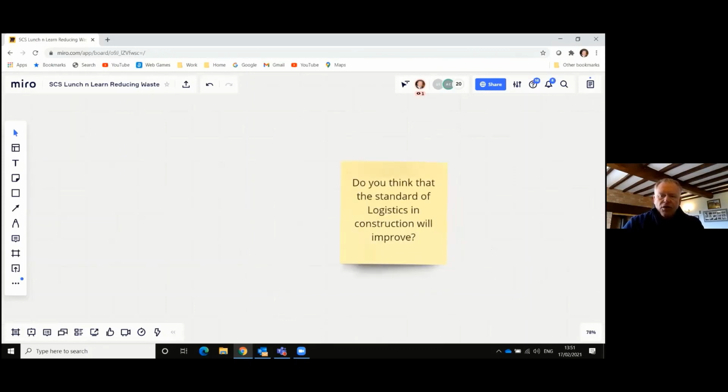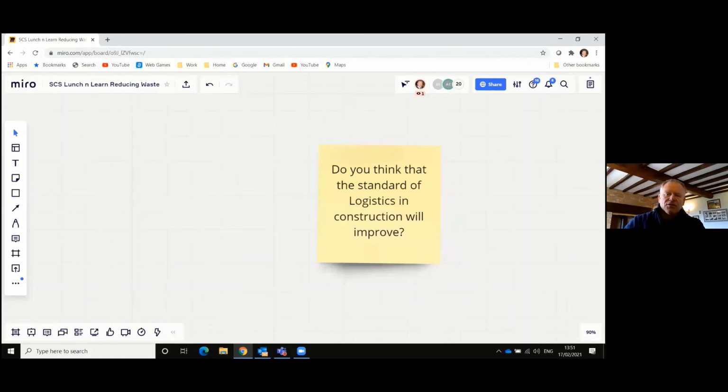Get them involved when you start to map out the process of your project and what it looks like and who's involved. Don't just think about the contractors doing the build. Think about the supply chain and the logistics bringing the materials in, and work with them to understand how you want that material brought in. Is it in larger articulated loads, or is it in smaller day-by-day deliveries?